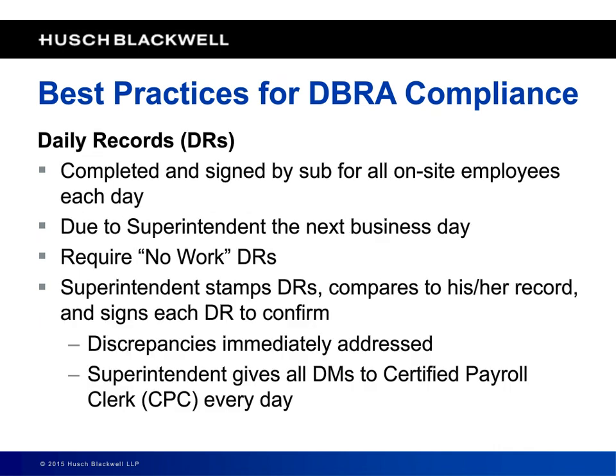You've got to have some sort of record in addition to just what comes back on a certified payroll that shows who was on the job site and for how long. It's insufficient to merely rely on the certified payroll alone to establish that. You should have some other contemporaneous record that you can use to check back against that certified payroll for compliance.